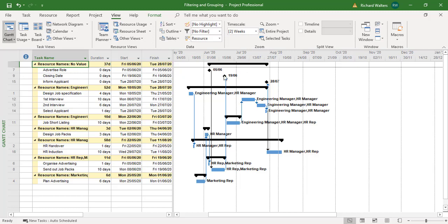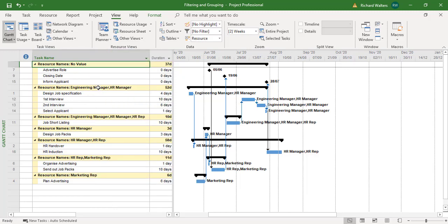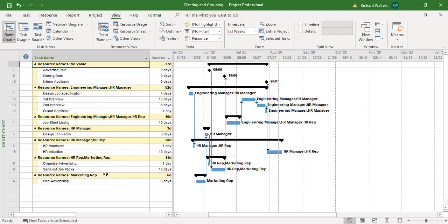And here it shows me where there's no resource against any tasks. The Engineering Manager, where they are, HR. So you can widen the column, we can see what's happening a bit more. And we can see what resource names are in what area for what tasks. So when you come to a certain task, you can then see which resources are on them. For example, there's four tasks here from Design Job Spec down to Select Applicant, where you've got the Engineering Manager and the HR Manager. HR Manager by the person self for a task. So you can really view your project by resources by grouping them together.